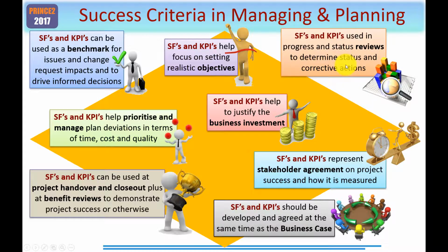And finally, they can be used mainly by the project manager when tracking progress and status reviews, and could be included within the project manager's regular highlight reports up to the project board. In addition, of course, to being used at an end-stage assessment.